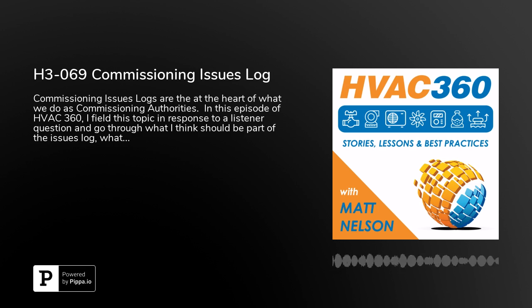It becomes the communication between you and the contractors, and it's also a place for the owner to check in and figure out how the project's going, what kind of issues are coming up, and if things are coming up over and over again, to take the pulse on what the commissioning process is doing. It's probably the thing that gets changed the most in the commissioning process. You have the pre-functional checklist and the functional checklist, but once those get set up, there's not too much change. The issues log is constantly having items added to it or items resolved.